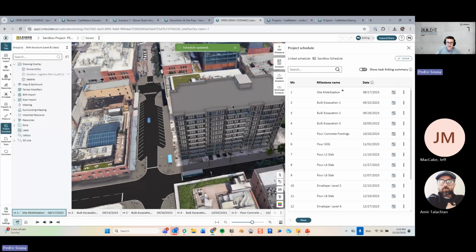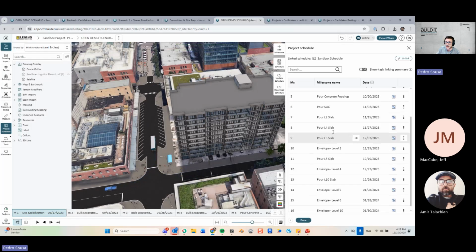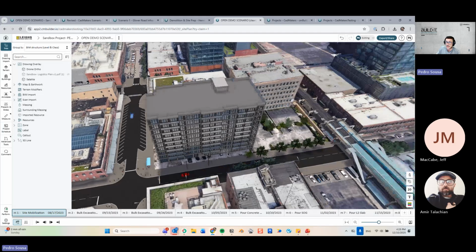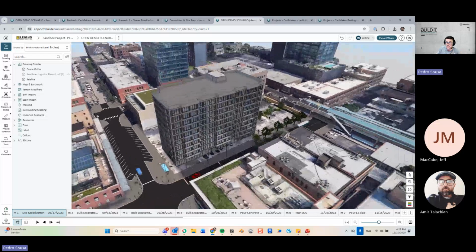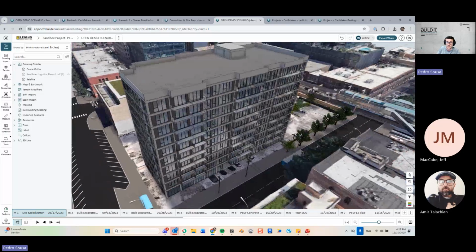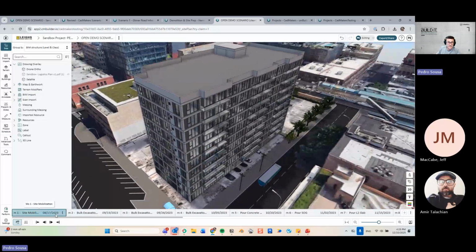Okay. So when I do that, I can simply hit next, and all of this staging here is going to be connected to my timeline, right? So I have all of these dates that are connected to my schedule file that I can simply update whenever I need to update the dates with a new version of my file and so on.